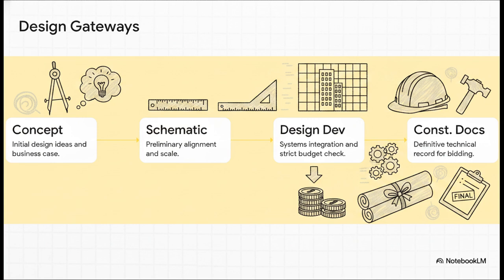Finally, we get to construction documents, which gives us the definitive technical record and the regulatory finality needed for bidding. The golden rule: never, ever let a team rush past a gate without formal, documented approval.